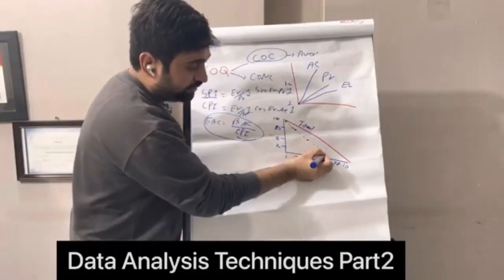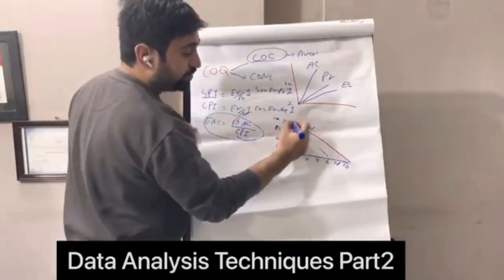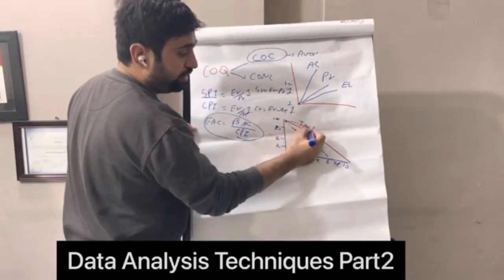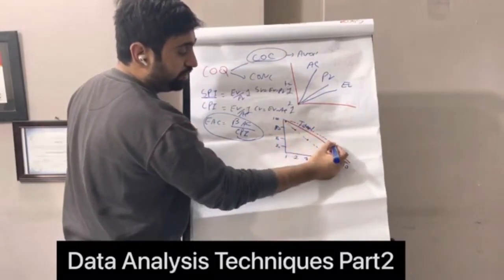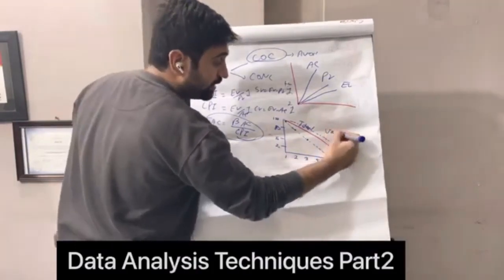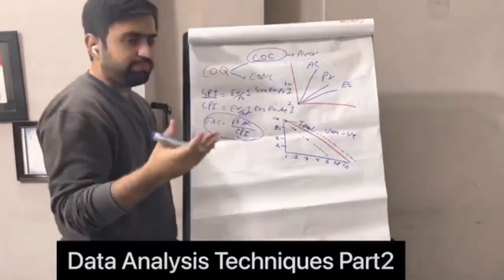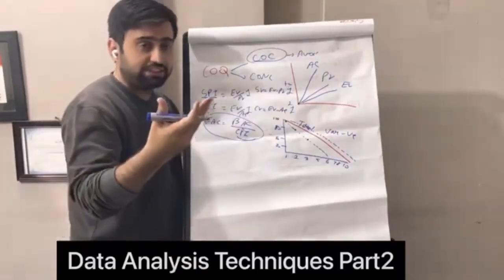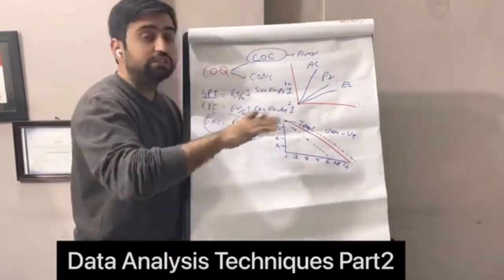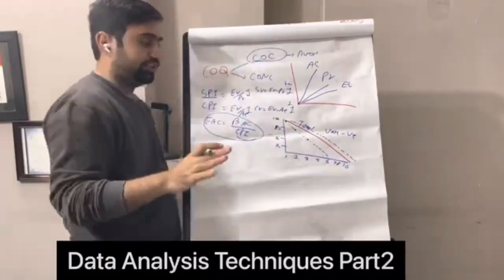Or if the burn down chart is on the upside, okay, let's say this is the burn down chart, then I will not be able to complete the work. Then the variance is negative, very important. At any time, the burn down chart is the data representation and data analysis technique to see where we stand and whether we will be able to complete the work in that iteration.